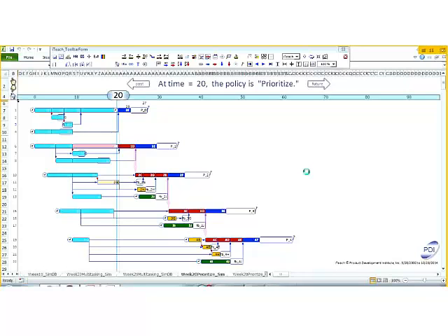So here what I've done is I've taken those policies and I've created a model to represent those current policies. I said we're going to work off the first project at a full level of effort, and there's no conflict with the second project, so we'll work off the remaining work on the second project. But then the red resource isn't available to continue the work here at week 20. The red resource is going to be available to continue the work at about week 23 or 24 or so. So I've made this little link here to indicate a release of the drum from the earlier project and the start of the engagement of the drum for the later project.